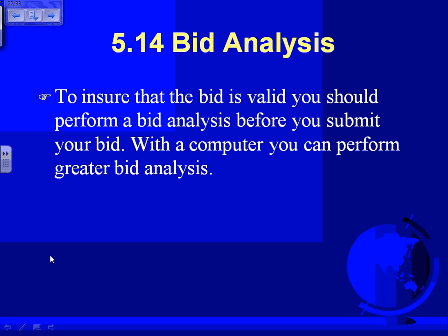Maybe the copper went up. That's as easy as, well, hey, the copper price went up. That's why we're higher. Good. Check. Move on. It doesn't mean you made a mistake. Yes, sir? Is there a specific percentage approved for this? There is no specific percentage. You, as a company, will collect historic data about the projects that you have done over the years with all these percentages and use them as gauging and benchmarking as you move forward.